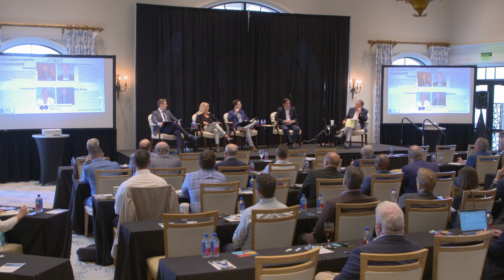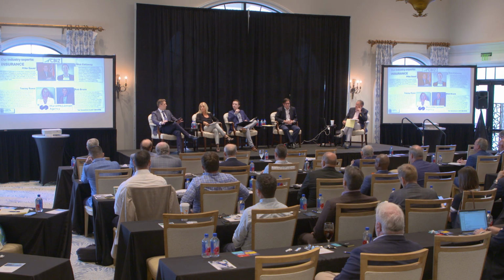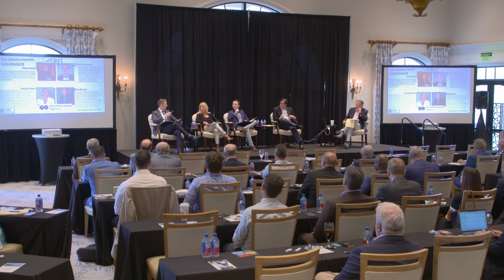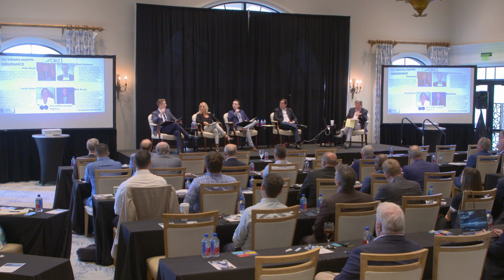And is there one area that you have the most discussion on with a different perspective than what you're actually experiencing? Yeah, I would say valuations is a big struggle right now. Even two to three years ago, it started to become very difficult. We're still facing that. Maybe some costs have gone down. Steel is still up, lumber is still up, all of those things. But the cost of construction, I mean, we had a client finish a build four or five months ago, a top-of-the-line fitness center, right? Everybody always says it, but it was like a $30 million fitness center, and it was built for around $900 a square foot, whereas a lot of clubs today are still maybe around that $300, $400, $500 a square foot.